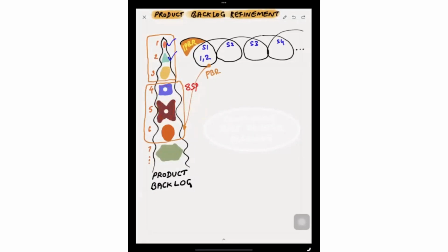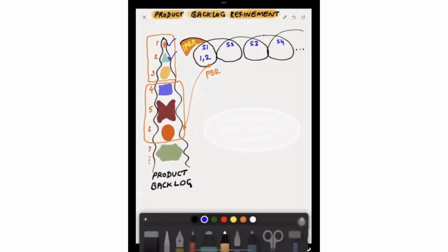So that means this information will help the product owner to reprioritize, reorder the product backlog items. So one of the activities inside the product backlog refinement is that, based on the information, reordering is also possible. Once sprint 1 is completed, they go to the sprint 2 planning on the first day of sprint 2. Because in the previous sprint backlog refinement, they have discussed all these items, the developers can select some of those items into sprint 2.